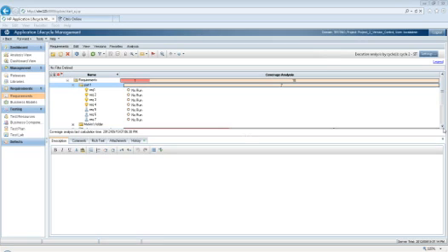Okay. Next question. I noticed there was a heading called traceability matrix. Can you tell us more about this feature, please? Yes. This is basically your impact analysis. Usually in your projects, you keep your impact analysis in maybe an Excel spreadsheet. So you have your requirement 1, 2, 3, 4, 5, 6, 7, 100. And then you mark with X which one it links to. So requirement 1 links to requirement 10.